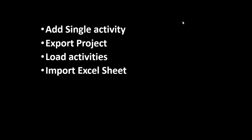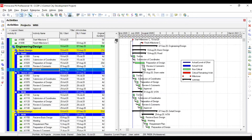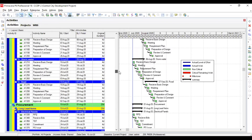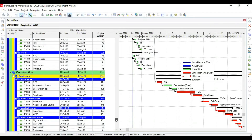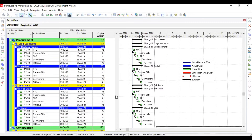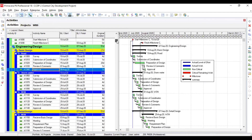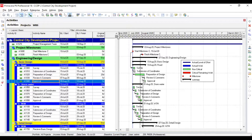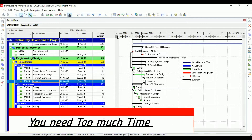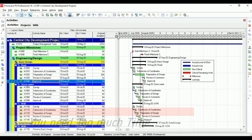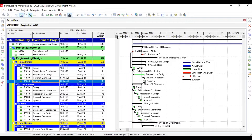I'll share the Primavera 6 dashboard so you can see that in a project with many activities, you can either load activities manually. If your project is small with limited activities, manual method is fine. But once your project goes over 1,000, 2,000, or 10,000 activities — complex projects — manual loading will consume a lot of time. That's why you should adopt this methodology I'm sharing now.